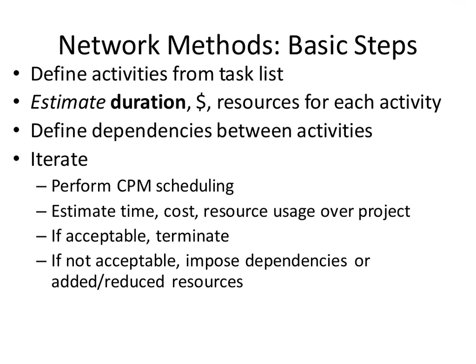You estimate the duration of these activities, and in some versions of this, you further indicate resources, including dollars, associated with them, and then you define the dependencies between the activities. Basically what you do then is perform a scheduling algorithm, which is a simple order n algorithm. So its running time goes up linearly with the number of tasks associated with this particular problem.